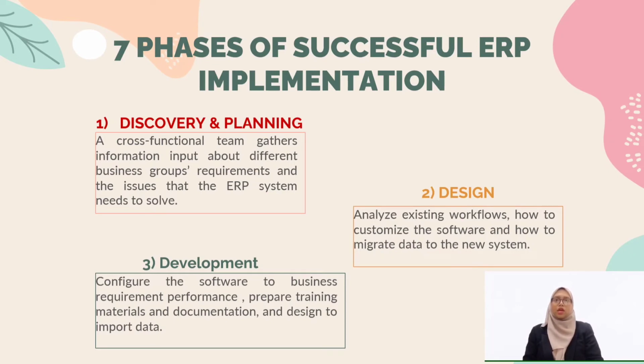In parallel with software development, the team should develop training materials to help users adjust to the new system. It also needs to begin planning data migration, which involves extracting, transforming, and loading data from multiple systems, each of which may use different formats and may hold duplicate or inconsistent information. The project team should determine which data to migrate in this phase, avoiding the blanket migration of all historical data, lots of which are likely irrelevant.